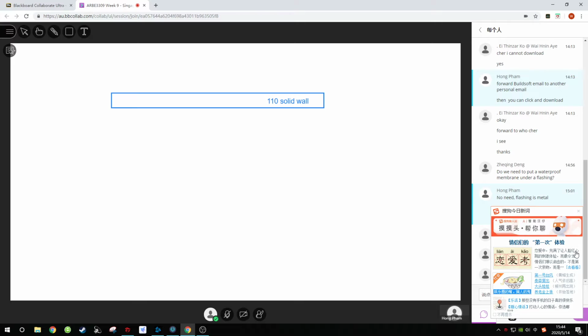For example, this size is 230 and this size is 500. This is a pier. Do you know why? Because the length is less than 4 times the width. As long as the length is less than 4 times the thickness, we call it a pier.